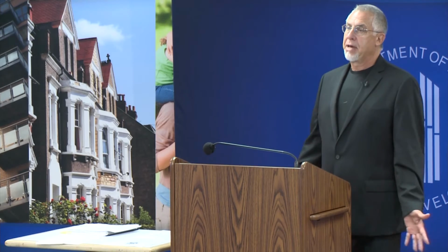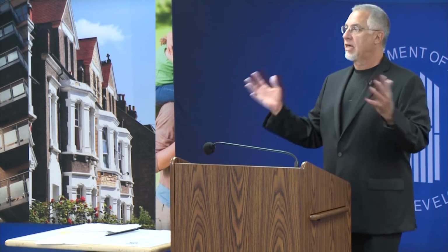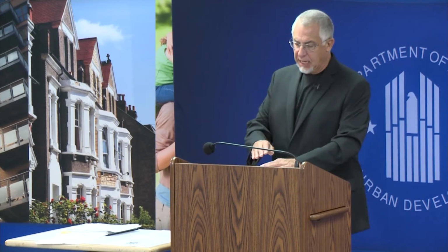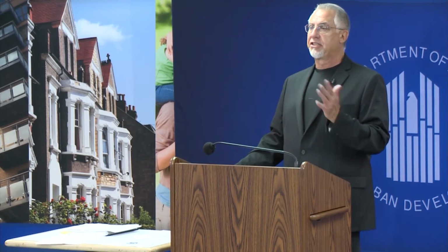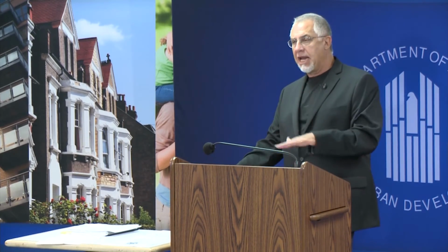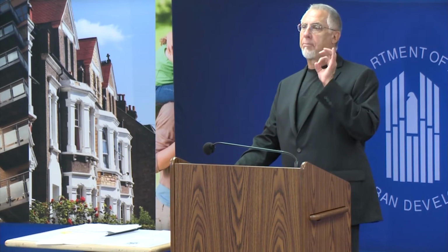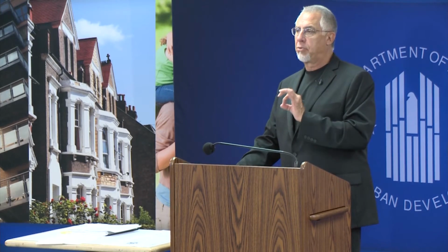Yes, essentially the change order really is a non-competitive proposal. You have no effect to competition. Therefore, actually I would say a price analysis is required. When you do not have competition, you must evaluate profit separately. So that brings us into a price analysis.